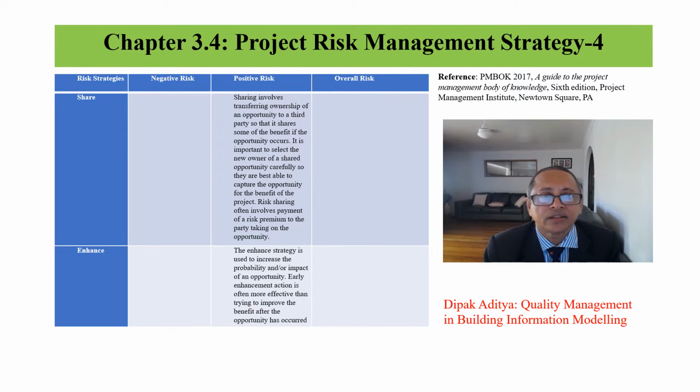Share and enhance risk strategies are used only for positive risk. Sharing involves transferring ownership of an opportunity to a third party to save the benefit, often involving payment of a risk premium. Enhanced strategy is used to increase the probability and impact of an opportunity.